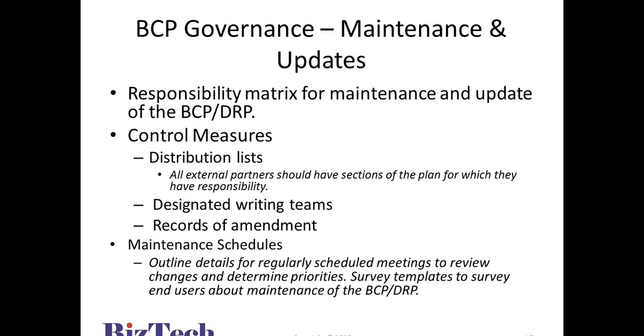And while you're developing, from an IT side or any other project side, for any project that's happening, business continuity should always be considered and availability should always be considered within the project. Security and business continuity and disaster recovery should be required considerations for each project. So it shouldn't be that you made the plan now and then when you have another project going on, you forget about it and you don't update the plan. So the plan should always be updated based on new projects, and it should be a control point before a project is completed and sign-off received.